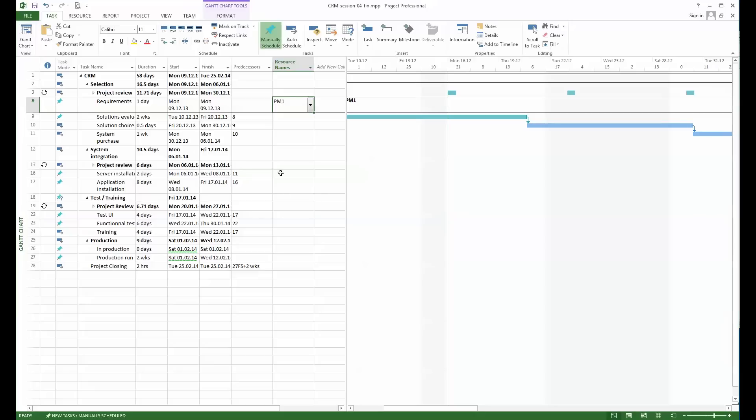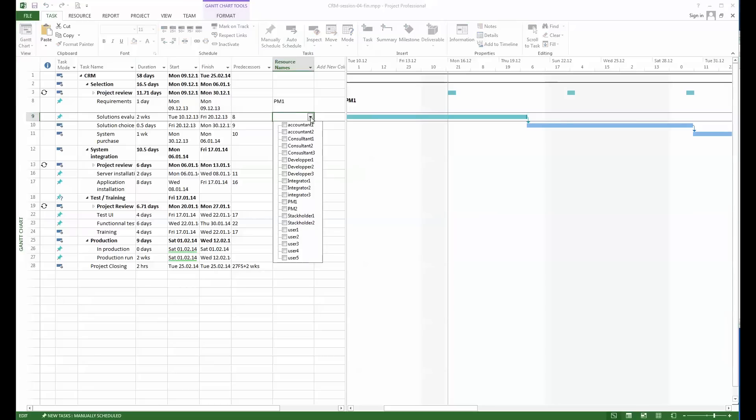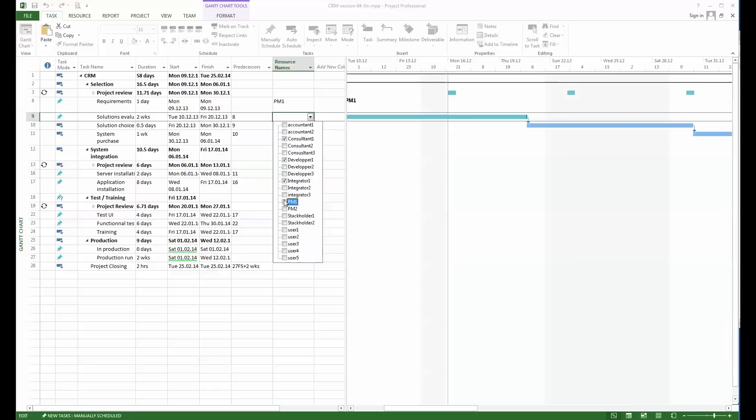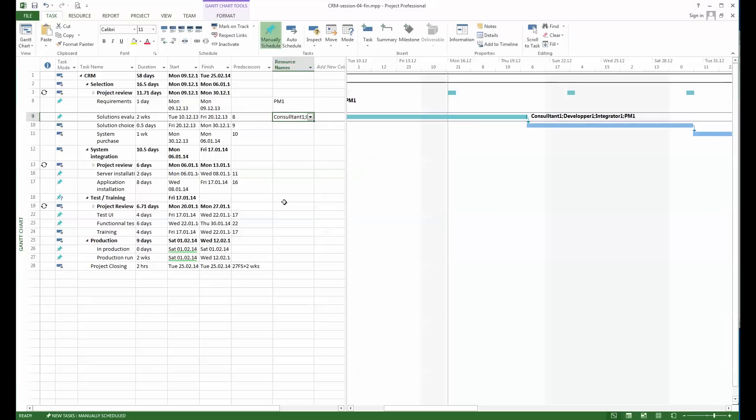Solution evaluation—I will say okay there I might need a consultant, I might also need one of the developers, one of the integrators, and maybe also the project manager. So we got here the list of the people that will participate during that evaluation.